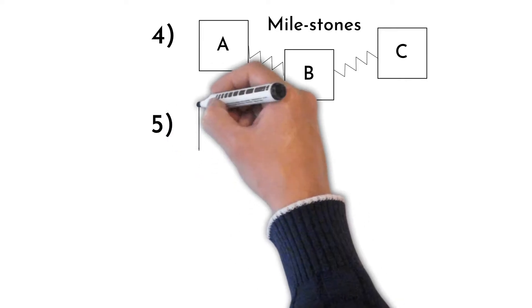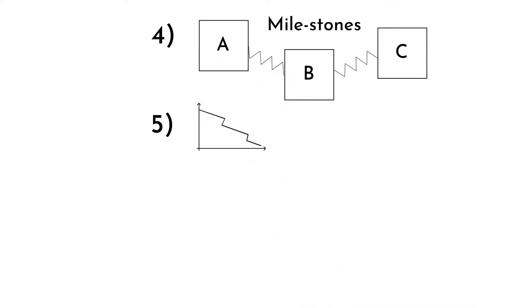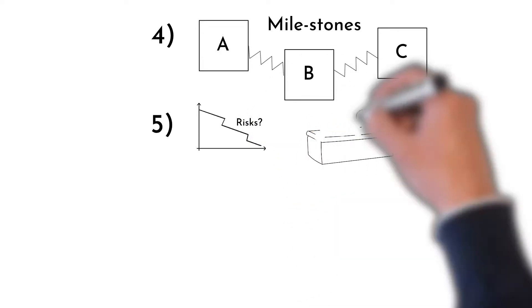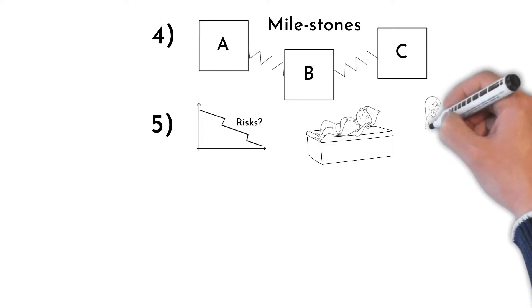In step number 5, evaluate risks and define reaction to them. Risk example: child will get sick. Your reaction might be, I will try to work while child is sleeping.